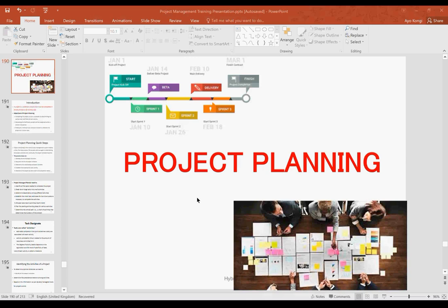What activities do we need to finish before we can start the next activity? What activities do we need to do before we can do the next one? Are there two activities we can do together? Yes, while Mandy is washing the rice, Bolaji can start washing the pepper and all that. So on a project, you have activities that you can do in parallel, and activities that have to start and finish in order. When you're sequencing the activities, this is what you are doing at this point in time.